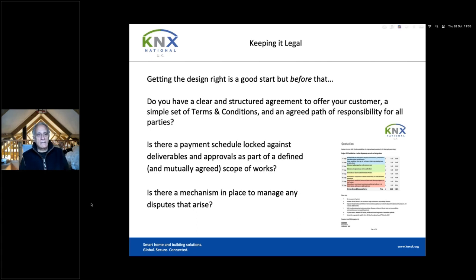This is not something that can be easily discussed or negotiated at the close of a contract, when a lot of these things have been long forgotten, but those days and weeks that pile on are at your cost, and they should be minuted as they occur during the process of the contract. It's important at final handover to provide copies of all non-proprietary software and programs as source code, clearly acknowledging that the client therefore owns a copy of the source code for the project, has the right to have this modified or updated by a qualified programmer of their choice. Retaining the software in order to maintain a hold over a client in the years to come is not regarded as acceptable.